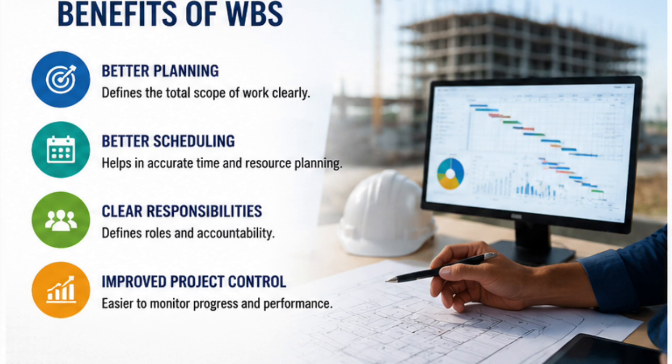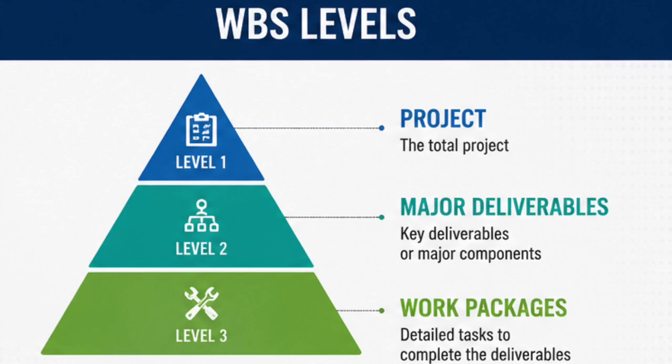Or if there are other parties, for example site preparation works being executed by one contractor and the construction works by a different contractor, then when the site readiness or site preparation works are completed, that could be your milestone. So this is the second WBS level, the milestones, as I told.